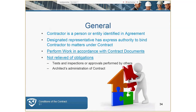Even though the architect may verbally say a substitution is acceptable, if it's not written down — not made into a change order or an architect's approval instruction — it's not an acceptable substitution.